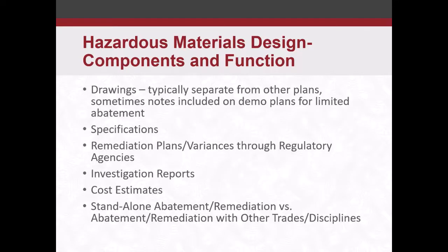What you see when you get a hazardous materials design is typical of any other type of discipline with building designs. You're going to have drawings, you're going to have specifications, you're going to have cost estimates prepared for the owner to get an idea how much the project may cost before they actually send it out to bid. You also will have, with the hazardous materials, investigation reports, the survey reports that show you that things have been sampled and evaluated prior to doing the design, prior to actually disturbing materials in the building, so you know what you have going into a project.